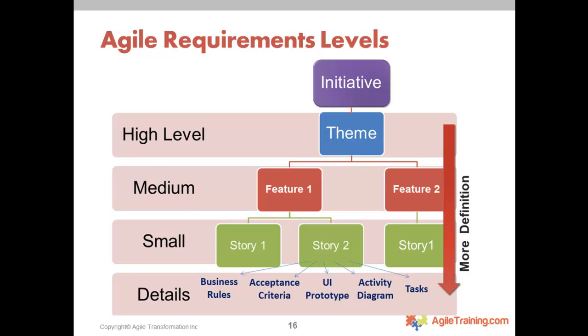So one of the first things we said is, as you brainstorm and put together your list of projects, which I would start with your current projects and then your future initiatives, you need to start breaking them down. You can't just bring in an item that's just an initiative and it's huge, it's an epic, and then say, well, let's prioritize that. That's too big. If it's too big, you should at least break it down into themes.